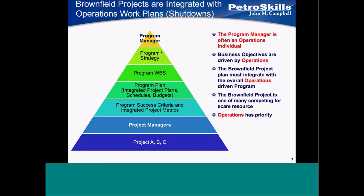Not because they don't form the basis for everything the program manager does, but this is where we sit in the priority. We have to accede to all these other things. And you can see at the bottom: operations has priority over everything. Because the reason they shut things down is to maintain surety of production in the future and ensure that all proper maintenance is done on record during a shutdown.